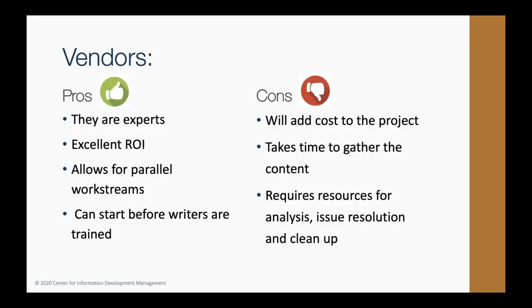All right, so I'm going to walk you through the pros and cons for each one of these three approaches, right? So the only time when it doesn't 120% make sense to have a vendor convert your content is maybe when you are planning for extensive rewrites to the content to make it more topic-based before you convert it, or if you aren't under any time constraints whatsoever.